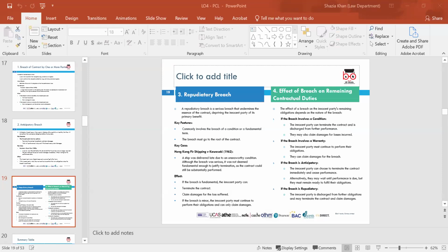Before terminating a contract, it's essential to be confident that you have the right to repudiate. If a breach is not expressly stated to be repudiatory in the contract, it is risky to terminate the contract. If you terminate, you would be relying on common law right to terminate for repudiatory breach, and in the event of dispute, a court will decide whether the repudiation was lawful. There are major implications of repudiating a contract or deciding not to do so. There are choices to be made which impact the damages that are recoverable.